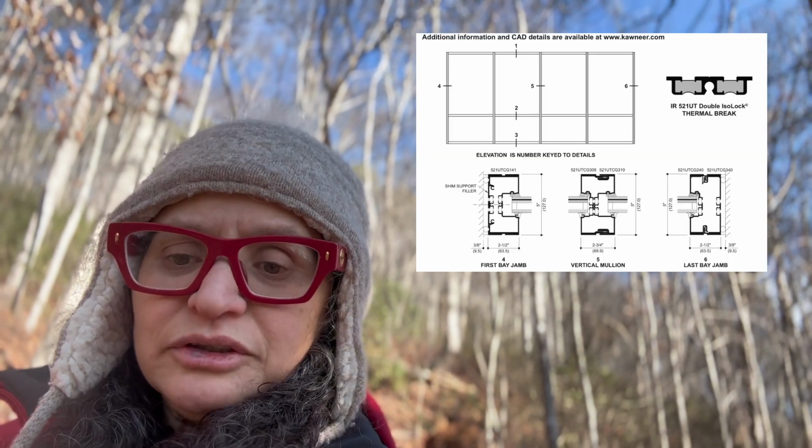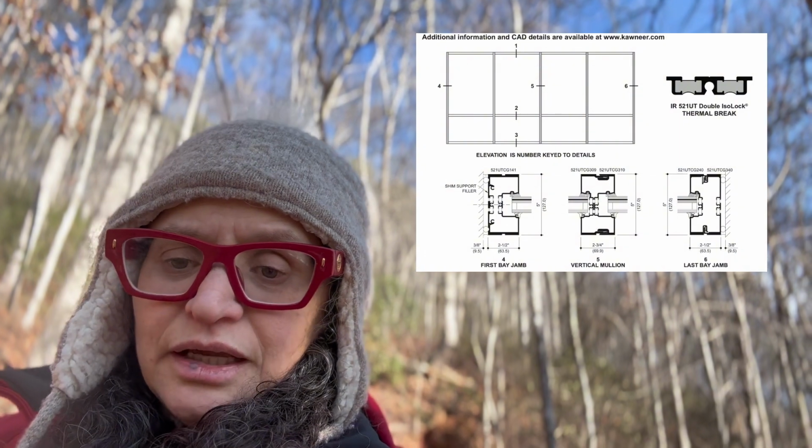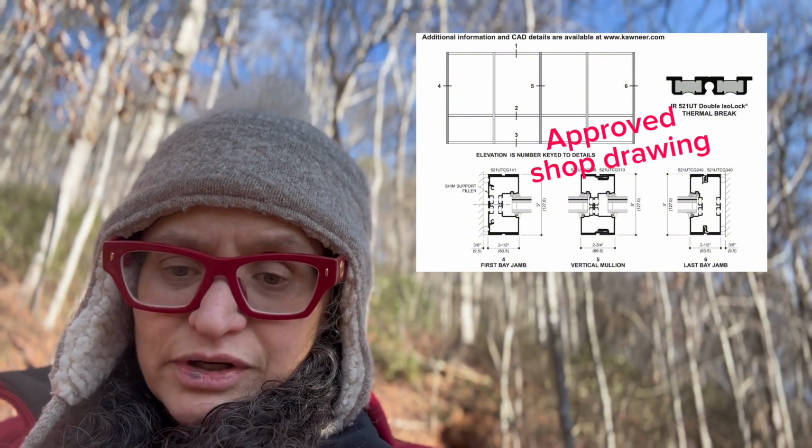Sometimes it's not. But in any case, the final review by the architect: they receive the revised drawings from the submittal and confirm it completes all the contract requirements from their drawings. They mark it as approved as noted. So as architects, we have a high responsibility to make sure that this design intent is obtained, but also that we meet the standards of the code. Approved and execution is terminated.